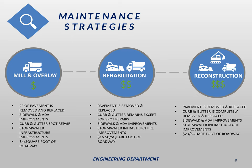The next type of project is what we call a rehab. This is where we will replace the entire pavement section but leave the curb and gutter largely in place. We will do spot repairs on the curb and gutter and make the ADA updates and storm sewer improvements as well. This project is more involved than a mill and overlay and, on average, costs about $17 per square foot of roadway.